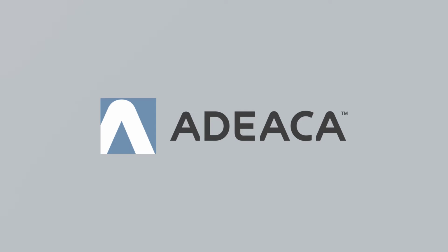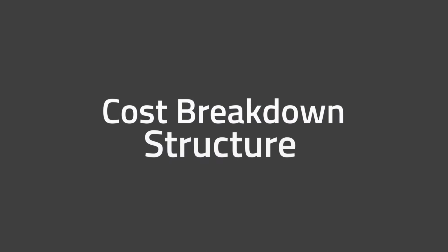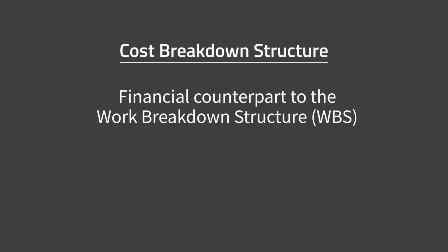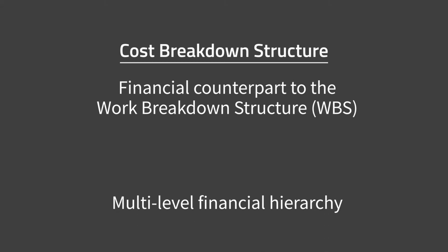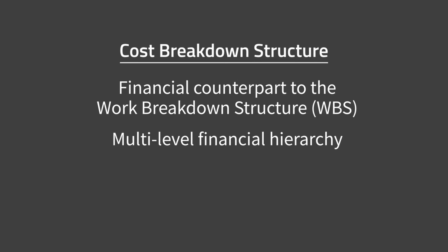In this recording, I will provide an introduction to the concept of a cost breakdown structure, or CBS, as it relates to project management. The CBS is the financial counterpart to the operational structure, the WBS, or work breakdown structure. The CBS is a multi-level hierarchy.